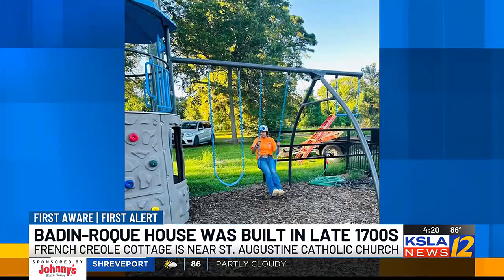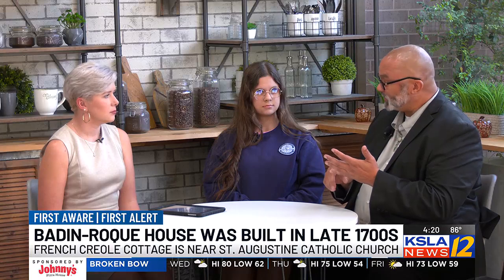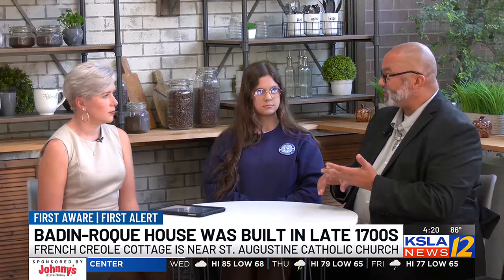Wow. So how do you go about restoring something that is so historical and has such a unique history and making sure that you're staying true to how it was originally created? Well, that's very important to us because we are on the National Register, and so we do want to keep it historically correct. And what we do is we work with a lot of experts. In fact, before we got started, maybe 8 years ago, we got a preservation plan. We had experts come and they looked at everything. They even had x-ray machines, and they told us what needed to be done, how it needed to be done, and also they gave us a cost estimate.